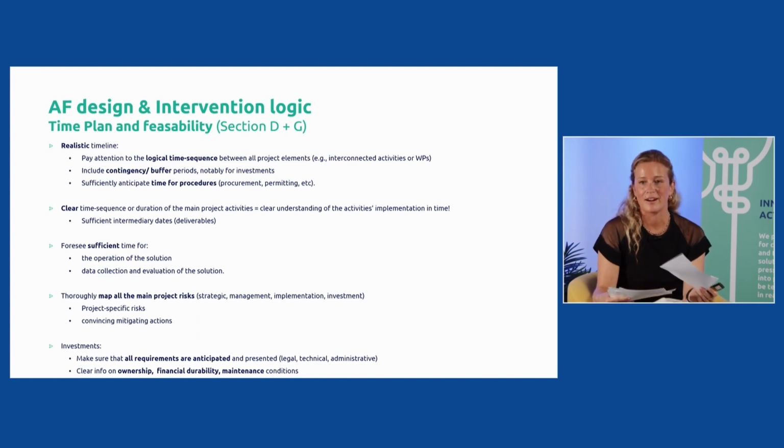Then your time plan must also be clear in terms of time sequence and duration, so meaning we should have a clear understanding of how your activities will be implemented in time. And for this, the use of deliverables is actually really useful because they are intermediary steps, meaning they provide intermediary dates. So it's then easy for us to understand how such activity will be implemented in time.